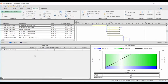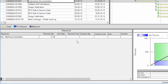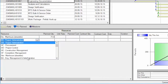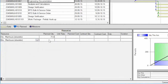Saffron Project offers several different ways of adding, editing, and deleting activity resources, but the easiest way is to use the resource view in the bar chart area. Here you can right-click and choose New Resource, then specify the required resource and add quantities to the planned quantities column.